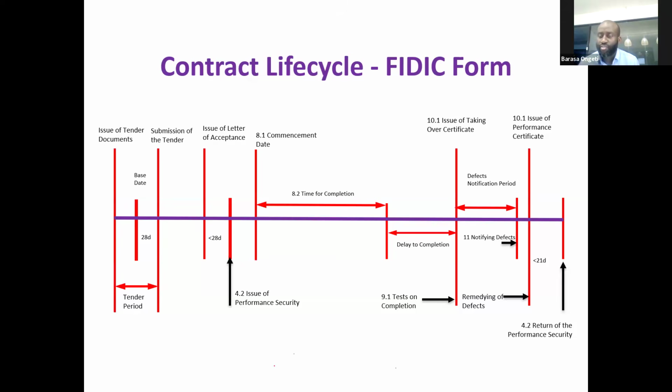Please, can I get these notes? You'll speak to Roads Hub. At what point does termination apply if there's also interest on delay payment? Interest on delay payment has nothing to do with termination. The clause for termination gives certain conditions for termination, and interest on delay payment is not one of them. Who's terminating here? There are two terminations, by the contractor or by the employer. Both of you have equal rights.